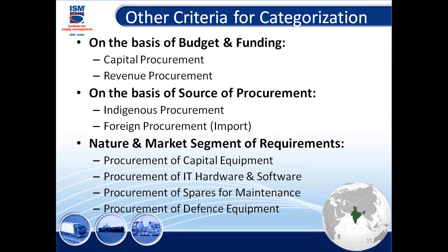Now on the basis of source of procurement also comes up the categorization. Is it bought locally? Is it bought through the foreign procurements? The key difference is when I do indigenous procurement, it does not mean the foreign suppliers can't bid. Foreign supplier might be based here. Foreign supplier might have an agency here. They can also bid like a local supplier. So if I'm doing in India, it will be all in rupees. They might be importing it, but all bidding is done indigenously.